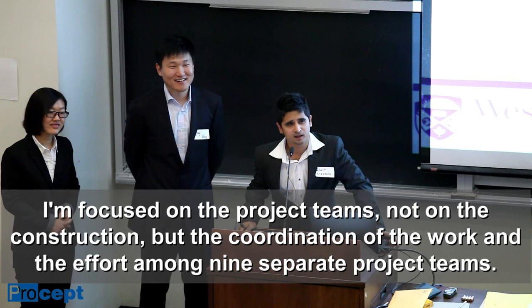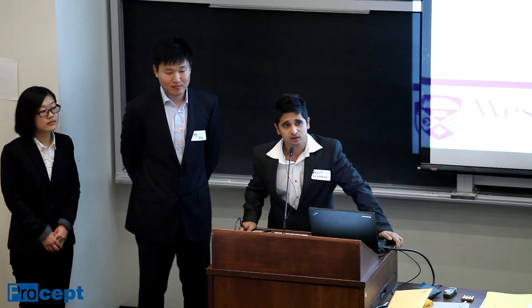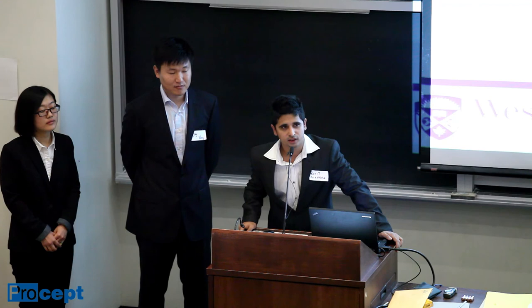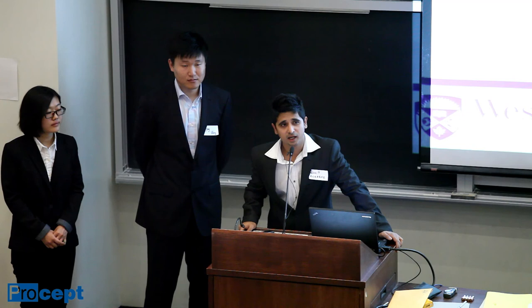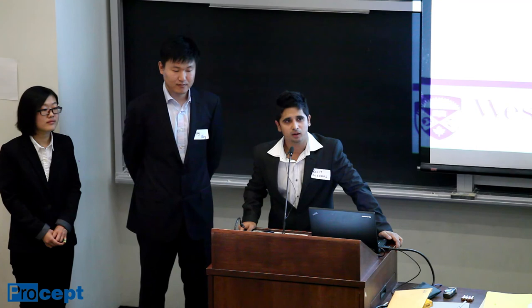They used the GPS system. It focused on the project teams, not on the construction, but on the coordination of the work and the effort among nine separate project teams. The coordination, I would say, was not required between the project teams, because they were building their own piers, and the project managers coordinated with each other to make sure that the collective goal is reached. And they had separate resources. The only thing that they had to coordinate for was the cement, which was made at a cement construction plant right at the site. So they were able to maintain the quality as well as make sure that the work is done on time.